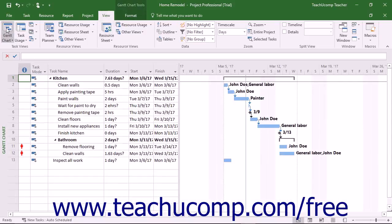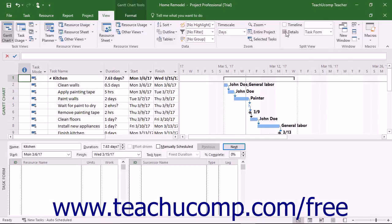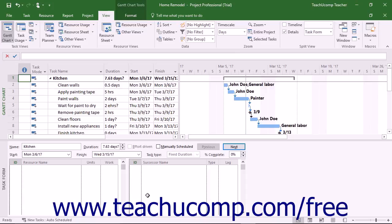You can assign material resources in the same manner that you add work resources. You can either add them through the Assign Resources dialog box or enter them directly into the task form at the bottom of the Gantt chart view when the window is split.